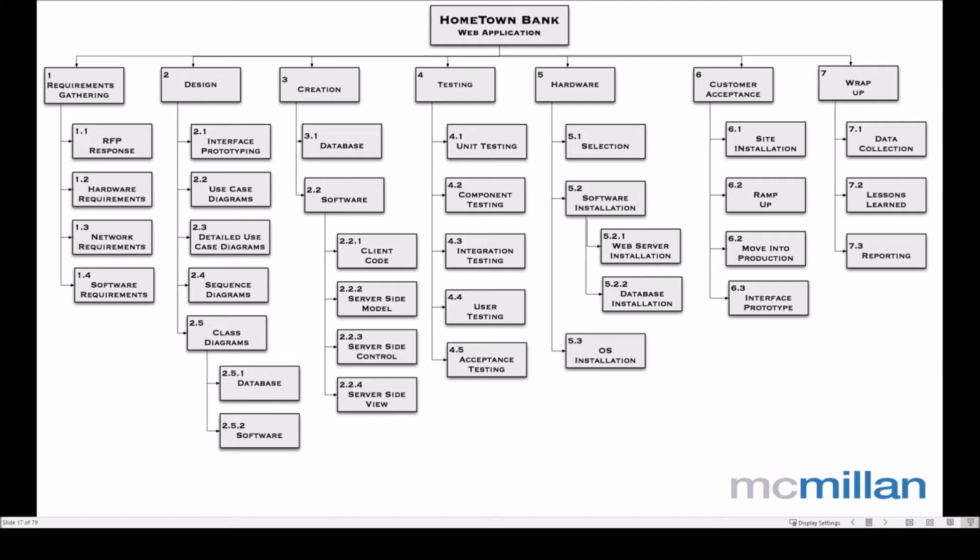For 2, the design, we're going to come up with an illustration, a design, or a design plan, or whatever describes that tangible. So then each one of those deliverables from 1 to 7 gets broken down into tasks.